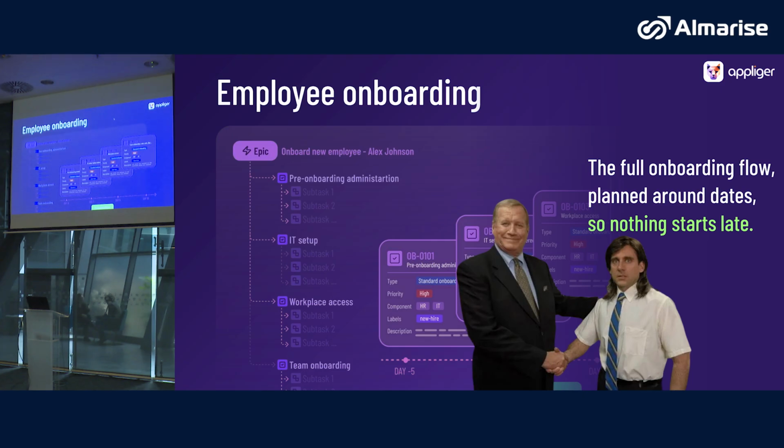Like for instance, a laptop needs to be ordered before day one, access granted end of day one, and the team introduction in the first week. So the person doesn't need to chase a checklist in their head. So the process is recreated again and again easily.